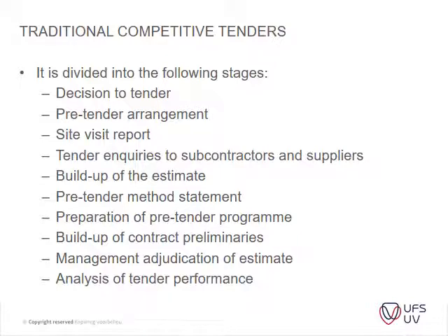Okay, traditional competitive tenders. So this is the one that we're going to focus on most. It is divided into the following stages: your decision to tender, pre-tender arrangements, your site visit report, tender inquiries and subcontractors, build-up of your estimate, pre-tender method statement and preparation of pre-tender program, build-up of your contract preliminaries and management, adjudication of your estimate, analysis of your submitted tender document.